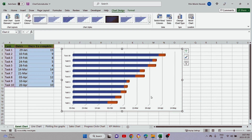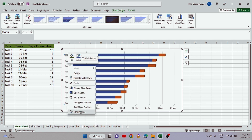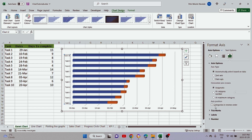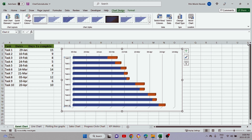Our chart isn't done yet because the dates are not correct and the tasks are also reversed — we want Task 1 at the top and Task 10 at the bottom. To fix this, select the task axis, right-click, and click 'Format Axis'. In the window that pops up on the right, under Axis Position, check 'Categories in reverse order'. Once we do that, the tasks will flip so Task 1 is at the top. We can close this panel.